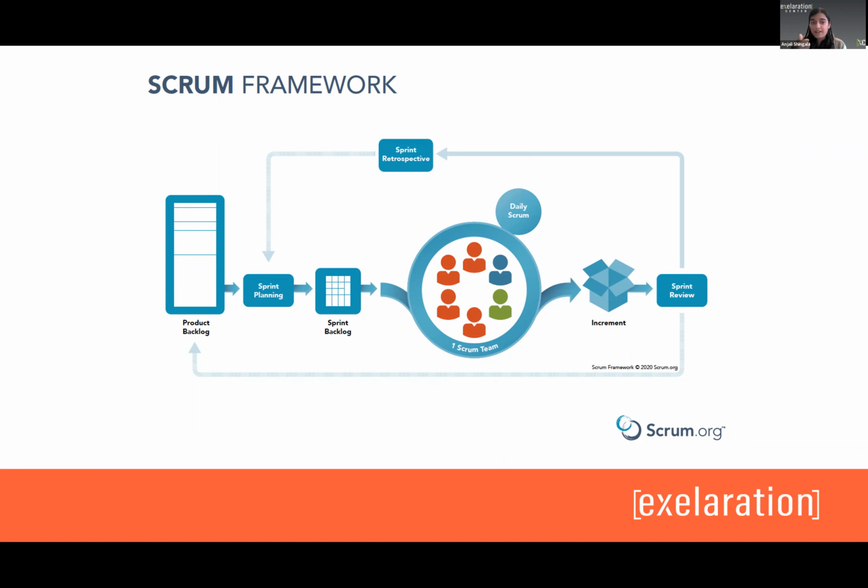But this overarching framework is pretty much across the board, which is you will start with a product backlog. And what a product backlog is, this is all the stuff I want in my product. I'm building a website. I want a way for my users to log in. I want a way for them to navigate around. I want a header on my page, whatever it may be, is all listed out for you here in this product backlog. So this is everything that you want in your product.